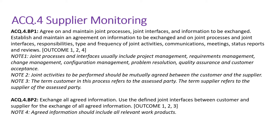The joint activities are also discussed as part of your contract document. When exactly the supplier needs to give the inputs or the outcomes of their activity as an input to the customer, at a particular frequency, by defining the milestones inside the contract document itself. We need to assess the supplier and track the progress of the suppliers. The performance of the supplier is to be tracked at a particular frequency — either weekly you will have a status call, monthly a governance call, or quarterly a business call.